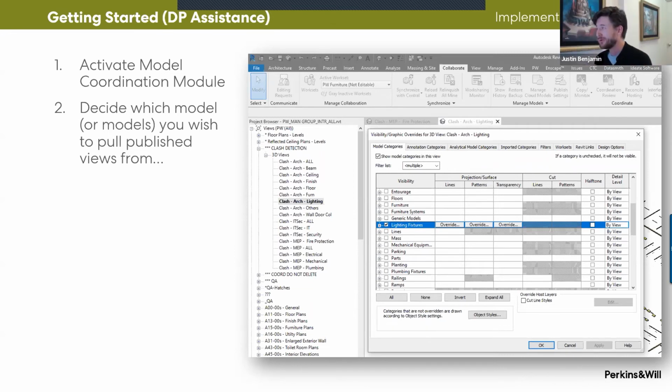And what's really cool and why this is better than Navisworks is that the coordination space is looking at your live models. So there's no file export or update model coordination. Every time your model is published, all right? So again, that's not the same as syncing to central. The web browser doesn't look at, or does look at your central file, but that's not really what you're seeing when you're looking at the web. You're looking at the published model. So if you're manually publishing, whether it's once a week or whatever, every time the model publishes to BIM360, it's updating your Clash set. That's it.